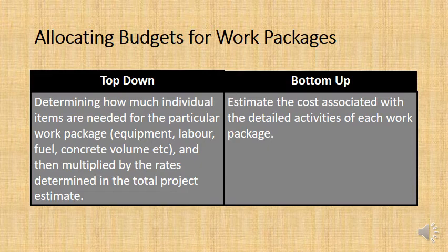Now, what can happen there is that budgets are overstated. If lots of different people are involved in the estimating and the budgeting, pricing different work packages, they are going to double up on the price of establishing and mobilizing a crane.